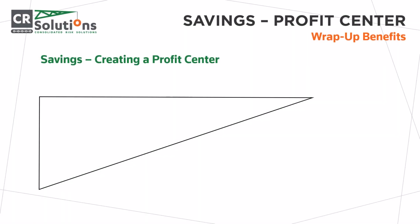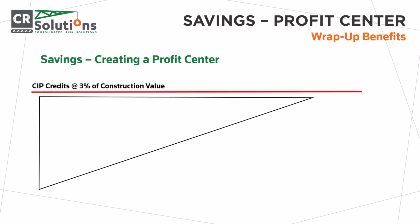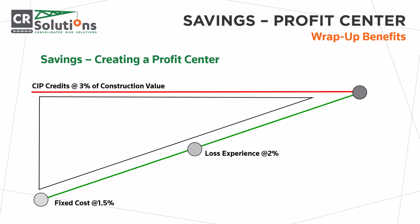This diagram illustrates how wrap-ups save money. The red line on top represents the insurance credits removed from the contractor's bids, otherwise referred to as the traditional cost for insurance. In other words, this is the amount that the sponsor would have paid had a wrap-up not been utilized. The green diagonal line represents what the sponsor will pay under the wrap-up. The lowest point on the green line indicates the fixed cost amount of the program. Fixed costs include all the premiums and fees that the sponsor will pay for the wrap-up with zero claims.